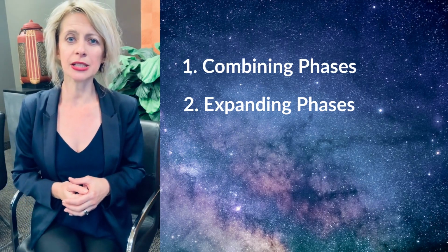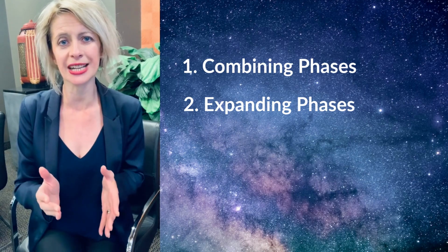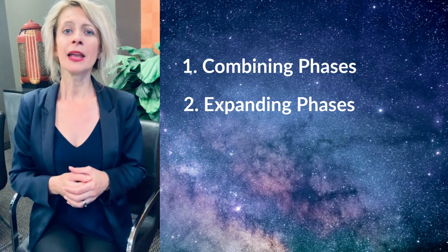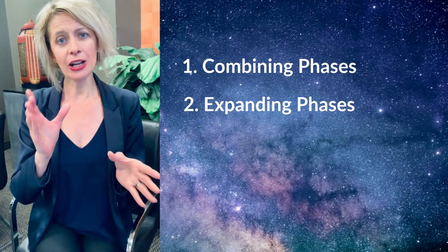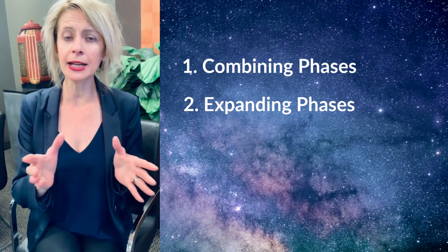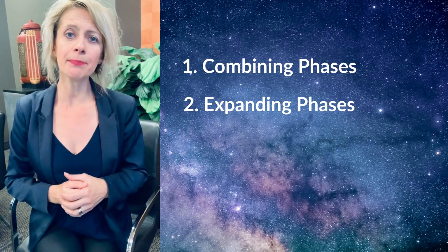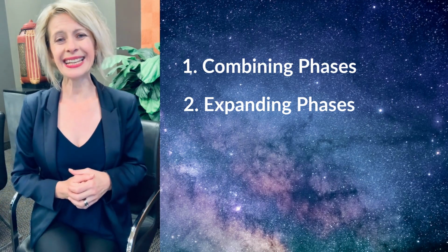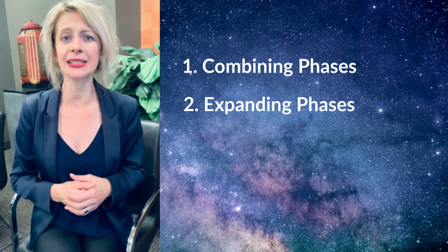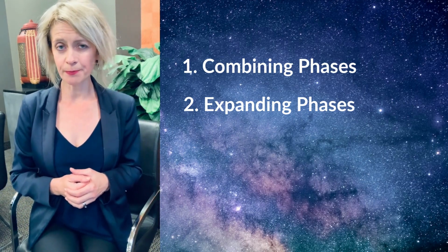And this approach is especially useful for high complexity and high cost projects where, for example, we might add an extra gate between the concept select and concept definition, and we might call it a concept screening, for example. And this often happens in order to better manage the concept phase where key critical decisions are being made, such as which solution should we consider.